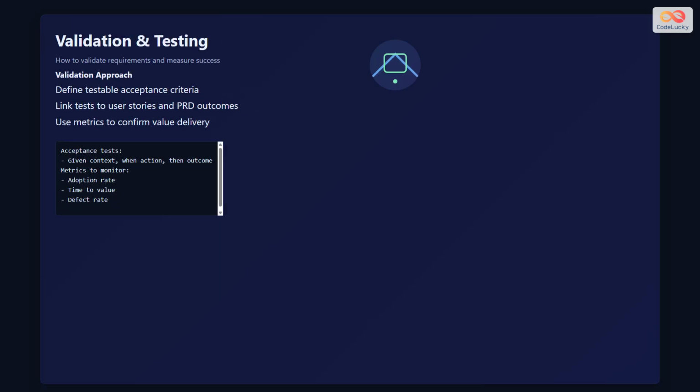Change management is critical when working with PRDs and user stories. First, version all documents with clear authoring history so you can track what changed and why. Conduct an impact assessment for each modification to understand how changes affect other features or timelines. Implement an approval workflow where stakeholders sign off on significant changes before they're implemented. Keep records of all approvals to maintain accountability and traceability. This structured approach prevents scope creep, ensures alignment, and protects your project timeline. Regular reviews help catch and manage changes early rather than discovering issues during development.